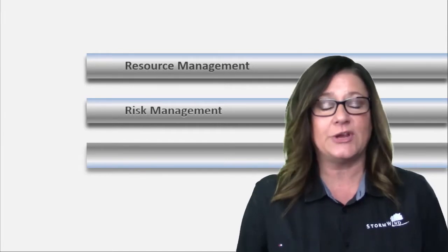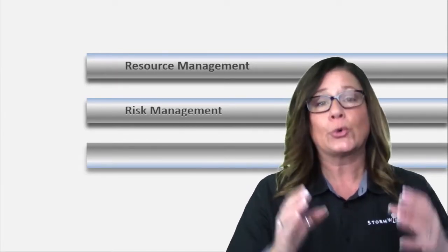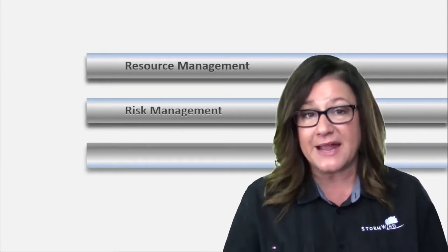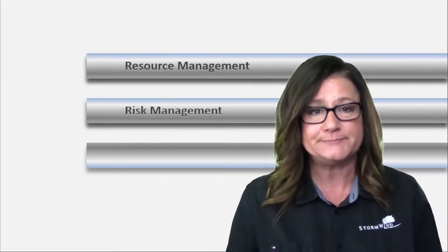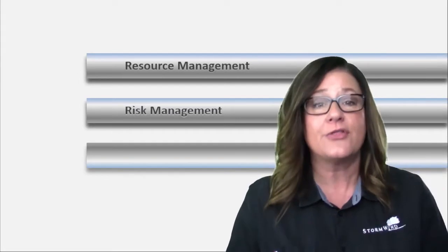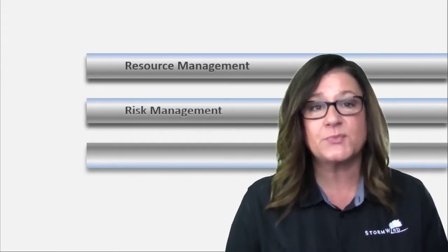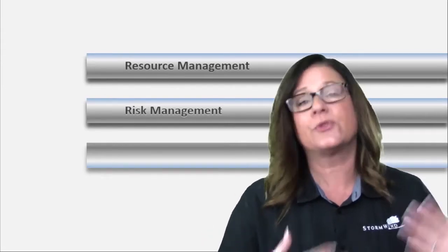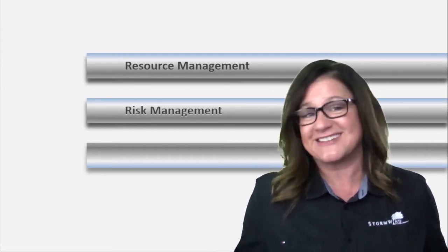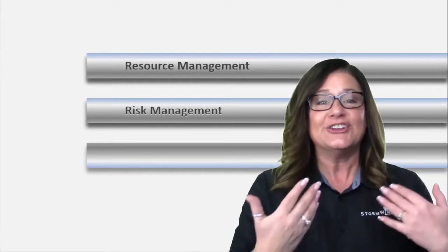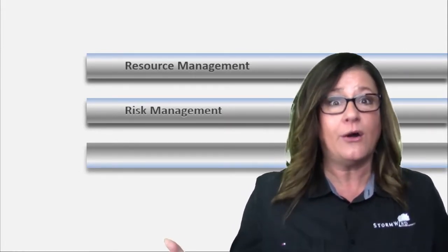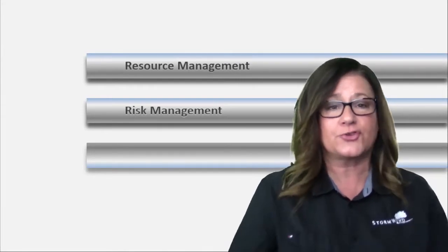Risk management means creating some kind of risk register, a running tabulation of identified threats and opportunities, their probability, their impact, what response we've selected for them, who owns the response, meaning who's the risk owner, the people that will implement the response, not our job for everything, and also what triggers will let us know risk events are coming.